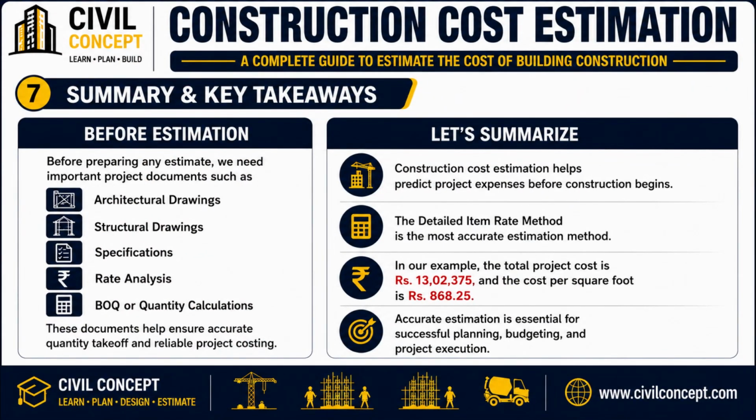Before preparing any estimate, we need important project documents such as architectural drawings, structural drawings, specifications, rate analysis, and BOQ or quantity calculations. These documents help ensure accurate quantity takeoff and reliable project costing.